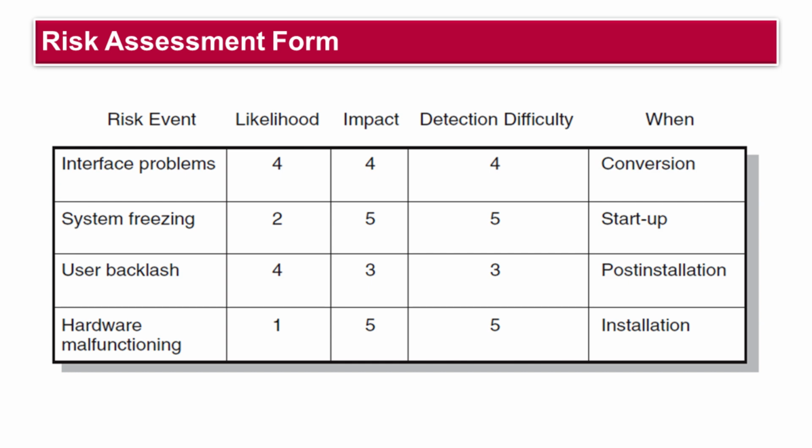This graphic is a partial example of a risk assessment form used on an information systems project involving an operating systems (OS) upgrade. Notice that in addition to evaluating the severity and probability of risk events, the team also assesses when the event might occur and its detection difficulty.